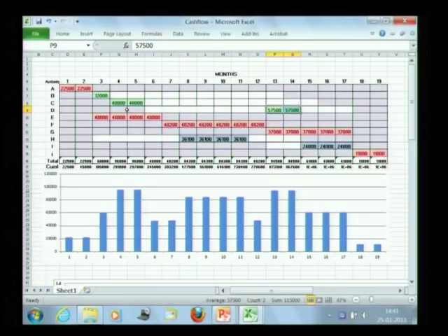I could split. I can take, for example, something like C, and say I am not going to do it in consecutive time; I am going to do one part of it here and then another part of it later. It does not apply in this case, but I could actually split an activity and meet expenses in different stages. Again, not necessarily the most efficient way, but if my cash flow dictates that, that is what I need to do.